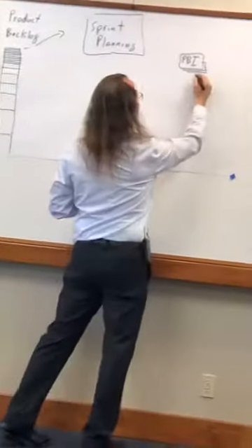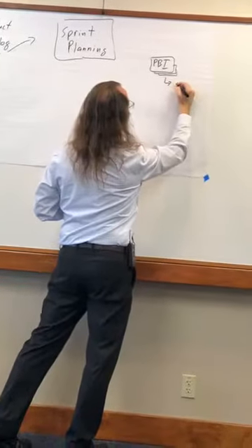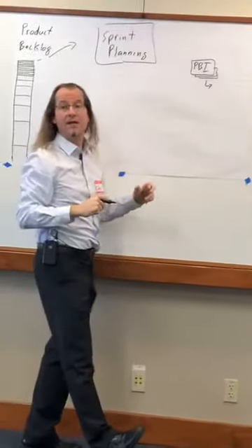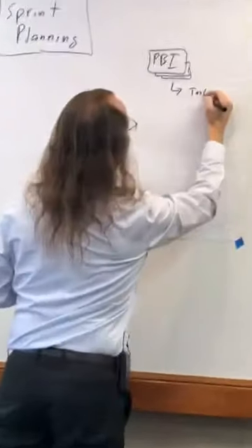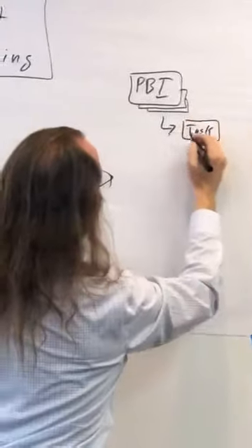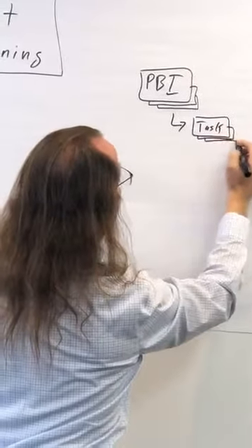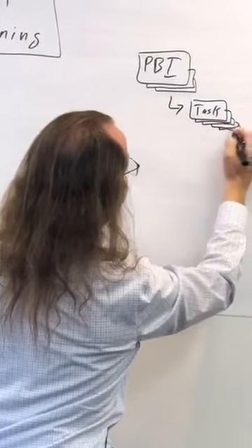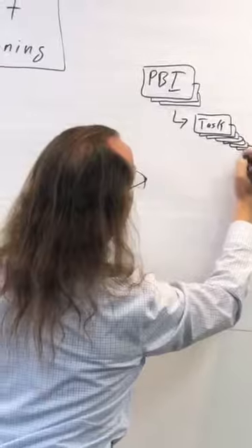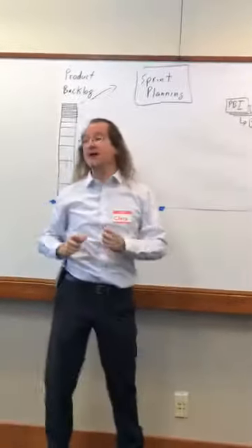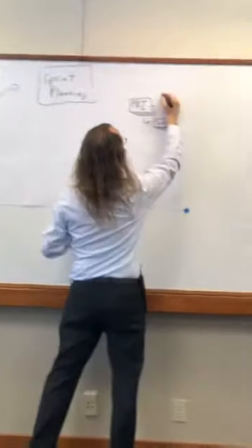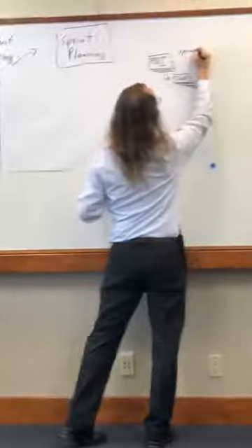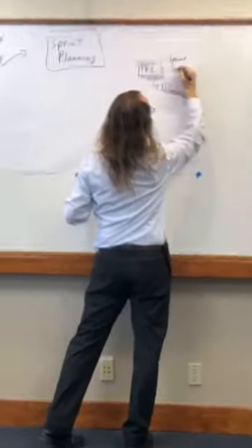And then in the second phase of typical sprint planning, the team will break each of those product backlog items down into tasks. And each product backlog item, or each story, will result in lots and lots of little tasks, either the actual pieces of work that people will do, and then hopefully that collection of product backlog items is serving some overarching sprint goal, right? Big picture goal that this sprint is serving.